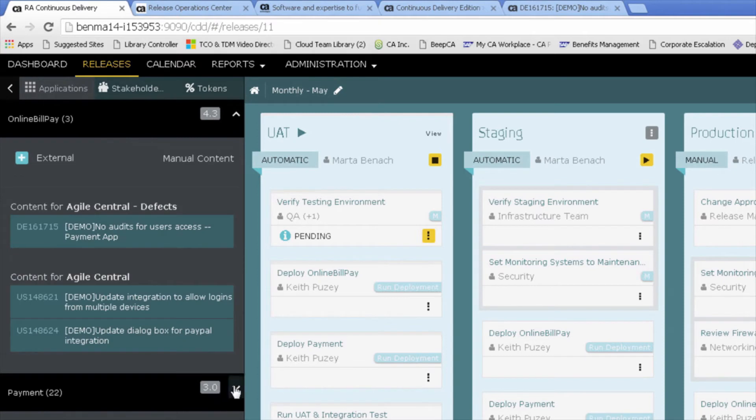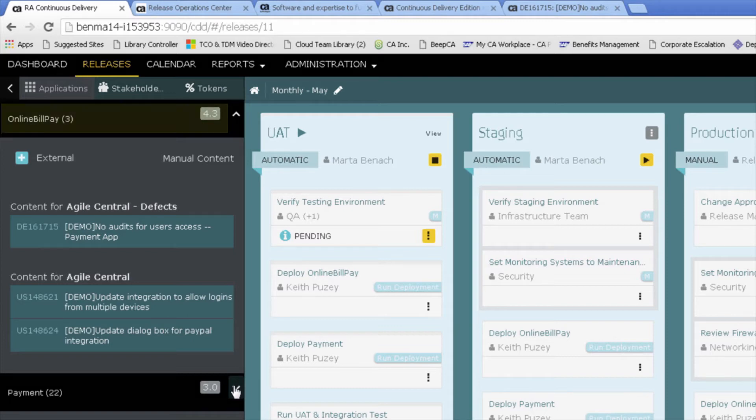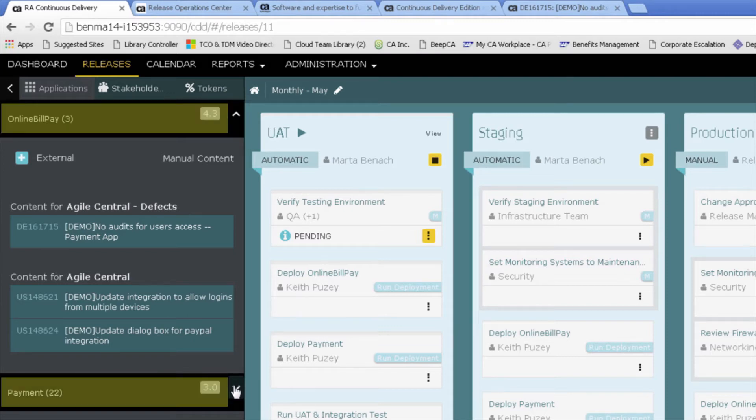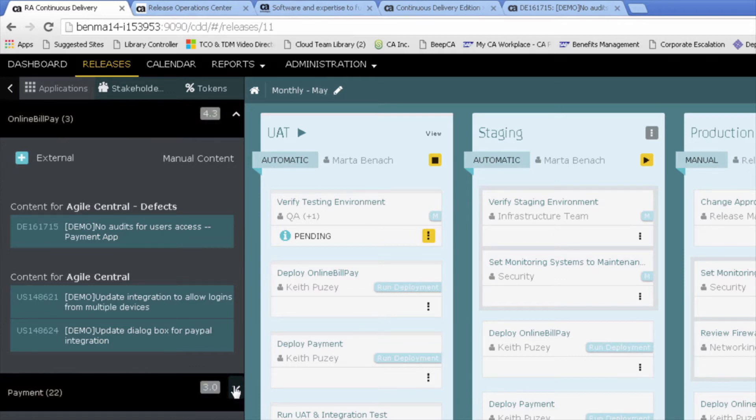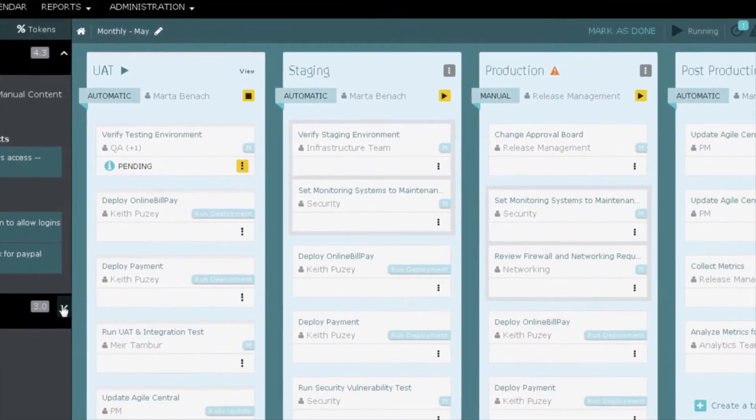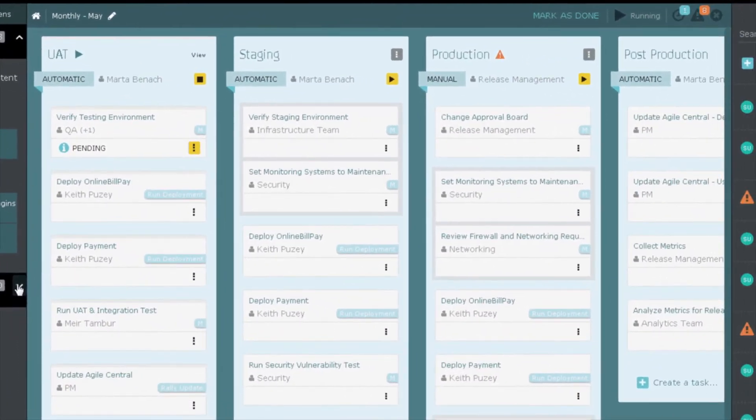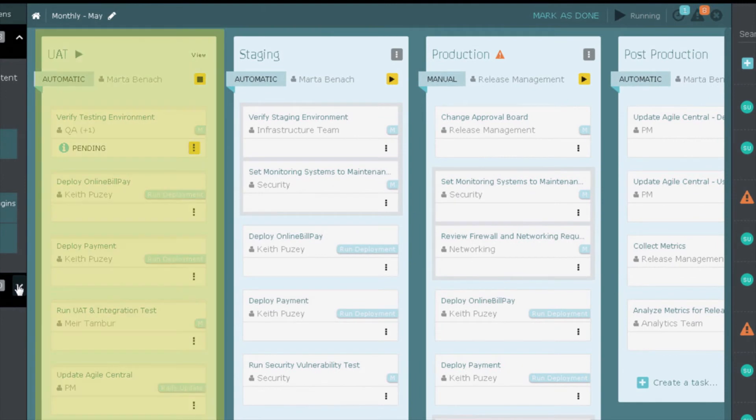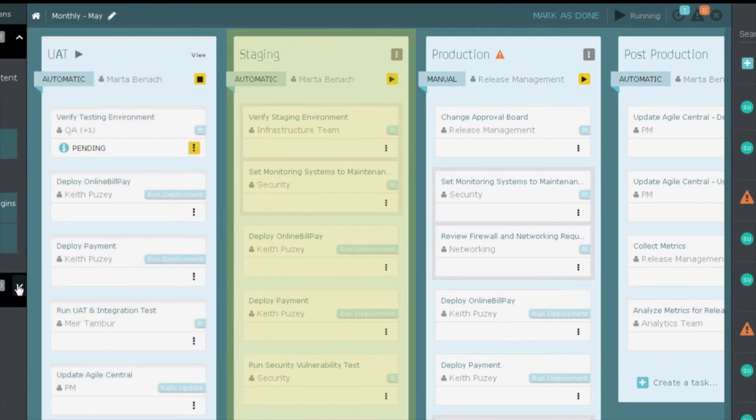This release maps to an Agile sprint with a cadence of one month. The May release will deploy two applications, online bill pay 4.3 and payment 3.0, which can be seen on the left. We have imported both user stories and defects for the application through our integration with Agile Central. We also have four phases defined: UAT, staging, production and post-production.